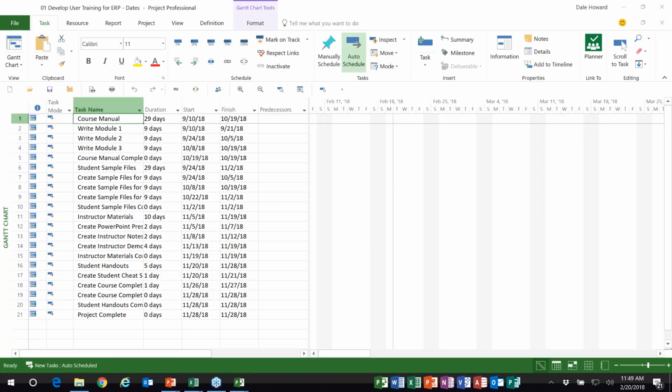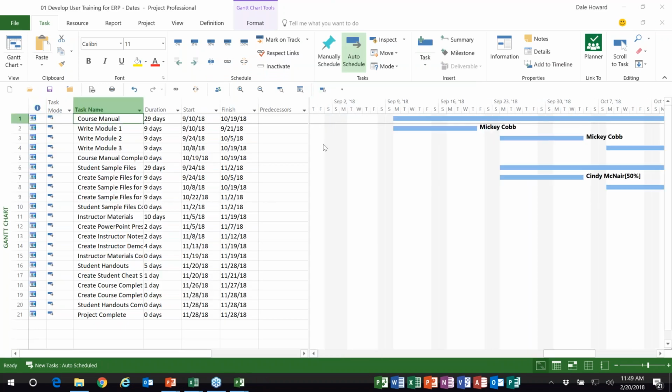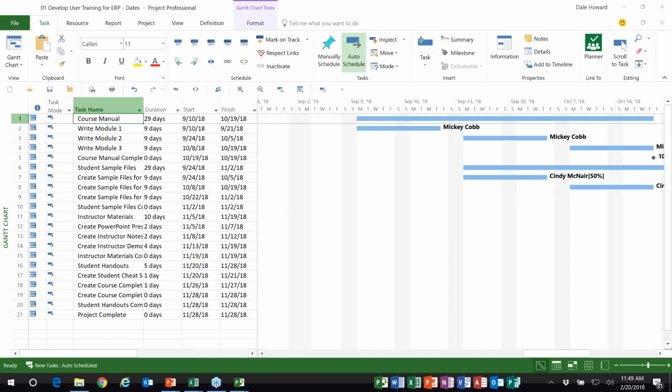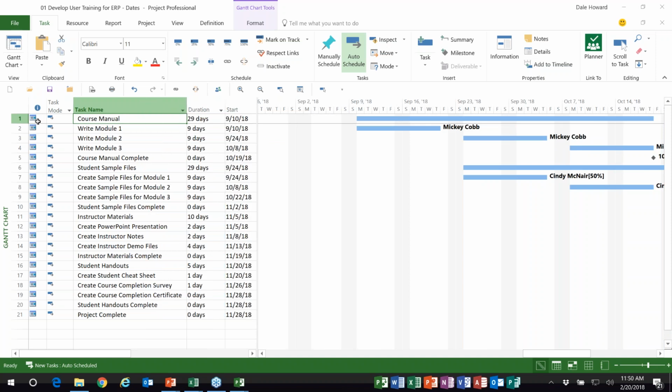Now, what I wanted to show you this, and prepare yourselves to be a bit disappointed. In the resulting Microsoft Excel or Microsoft Project schedule, I want you to notice the following. Number one, every task has a finish no earlier than constraint on it.